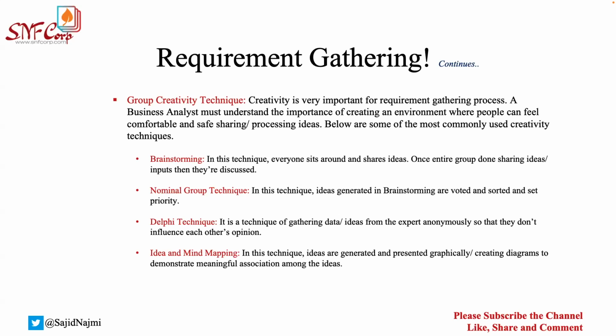The whole team will vote. They will provide an anonymous vote, and the highest voted items you will move to the action item section that you will actually take action on. When I say you, I mean probably just you, or your team, or everybody. So this is how you vote and identify which ones are higher priority and which ones we are going to take into action. You do that in nominal group technique.